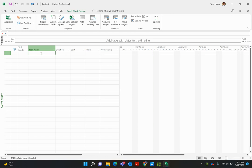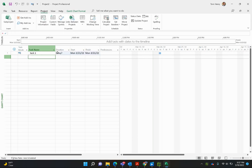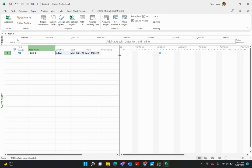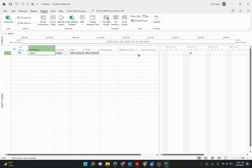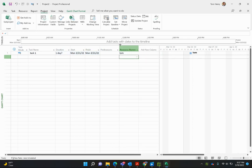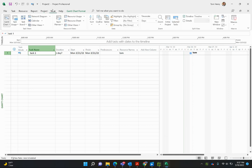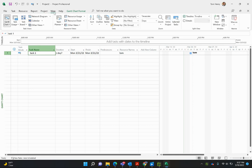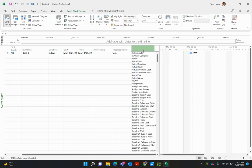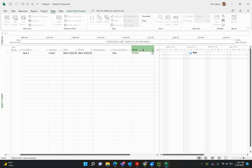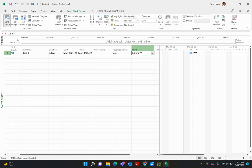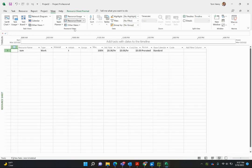So every time I put in a task, the duration is one day. You'll notice if I was to assign a resource to this particular task, they'd be working seven and a half hours. Or would they? Let's check it out. So View, and in fact I'm just going to insert the Work column. Seven and a half hours. Great.